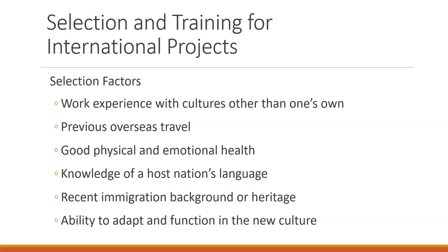I used to work on a project when I was at Iowa State with a company that has a lot of international business and trade, and they have locations in many countries, and they used to send their employees over to work in other countries. And they had a lot of failures because of culture shock and various other issues that are talked about in this chapter. And so then they developed a training program with their employees. So if employees were thinking about going international for a project, or moving over for a year or 2 or 3 to work at one of these other locations, they would go through this intensive training first before they sent them over to another country, so that the culture shock was reduced and the ability to adapt and work with other people within that country was increased.